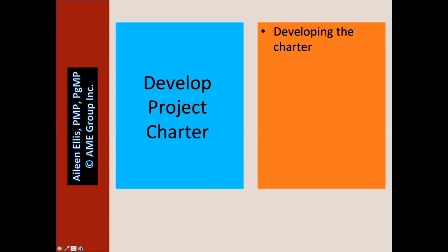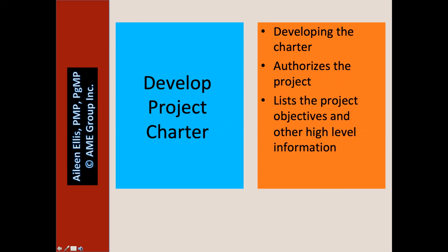We're developing the charter. We're authorizing the project. It lists the project objectives and other high-level information. It should name and give authority to the project manager.